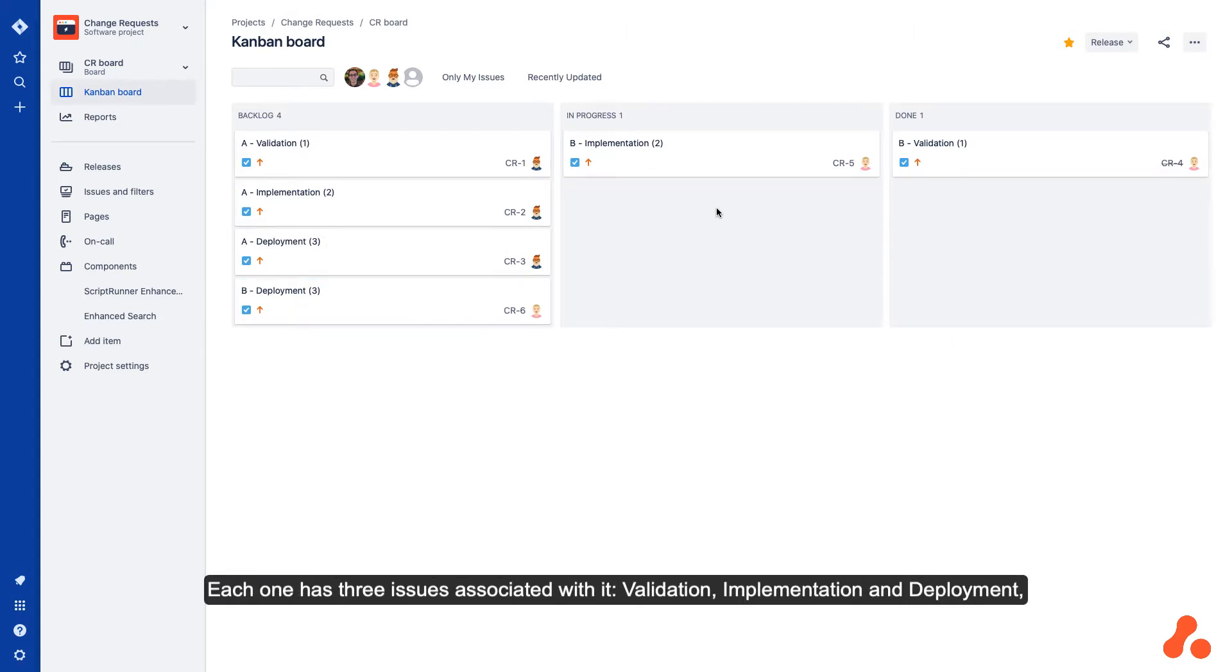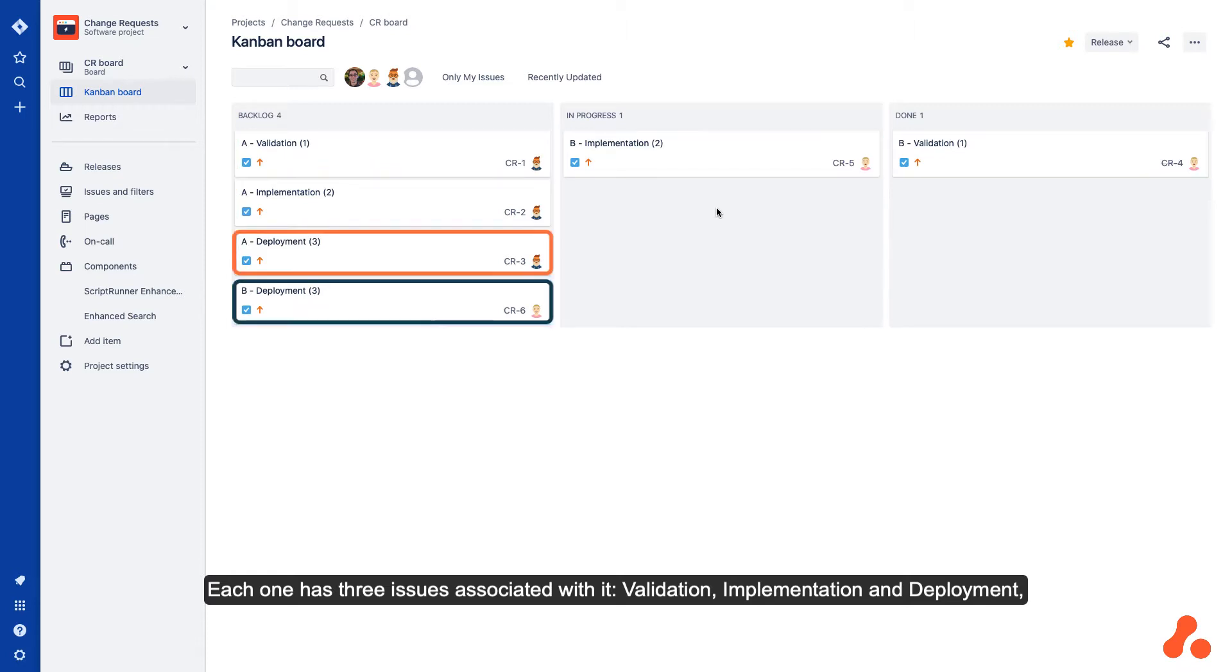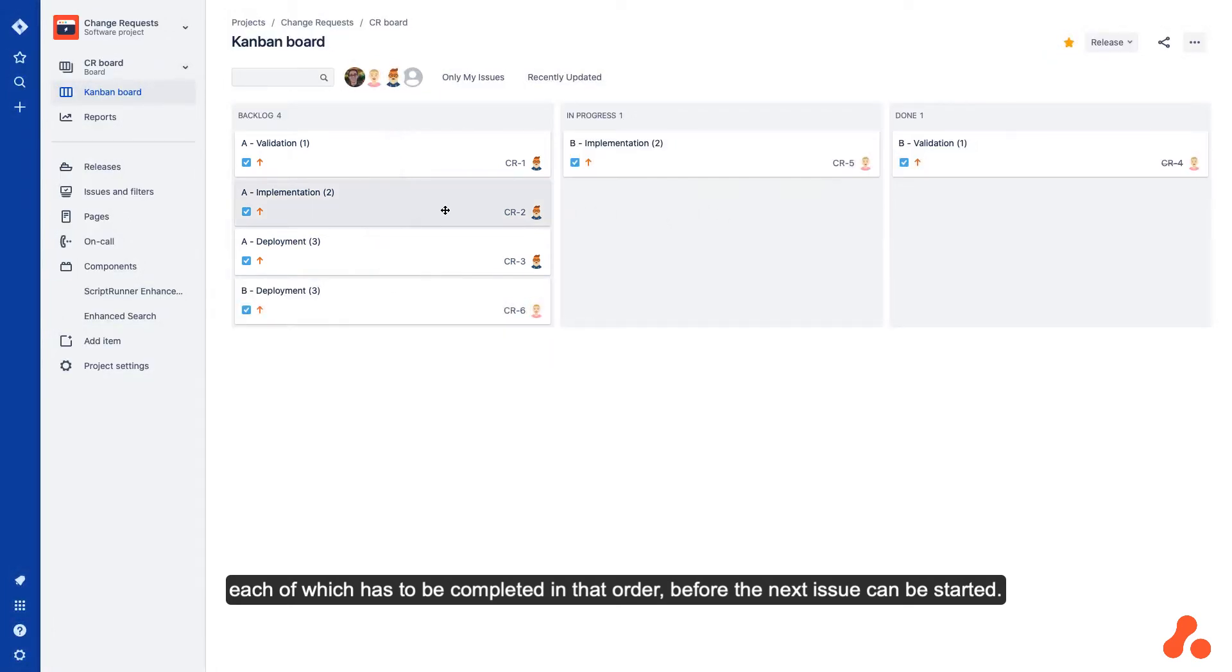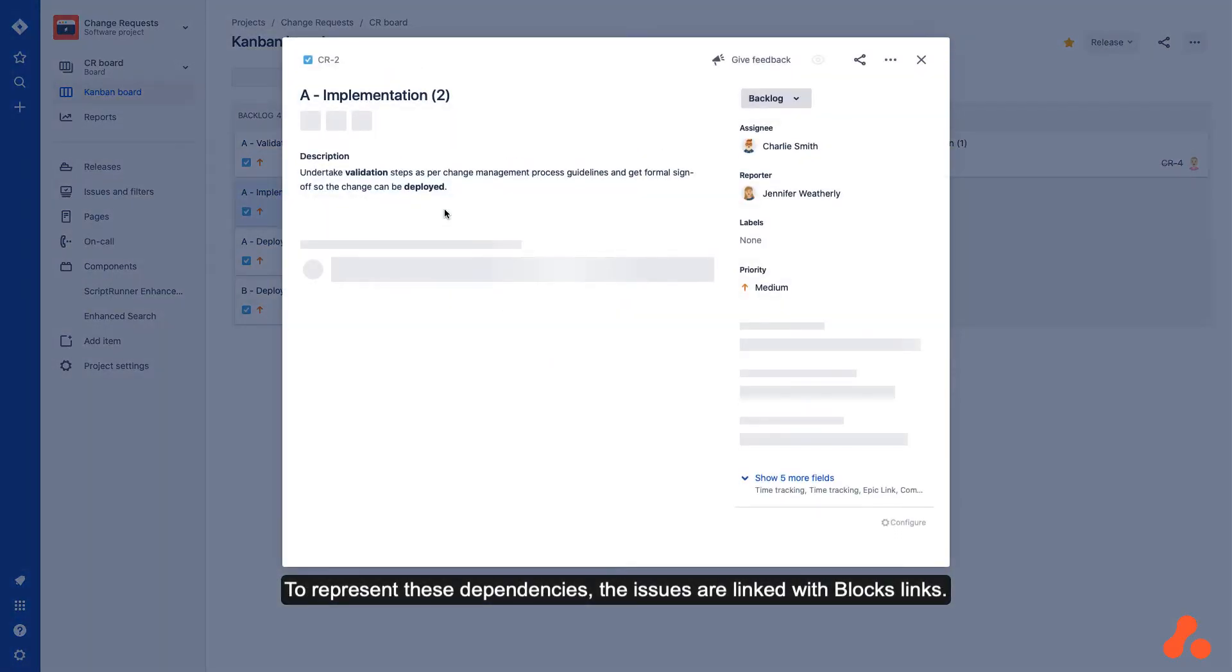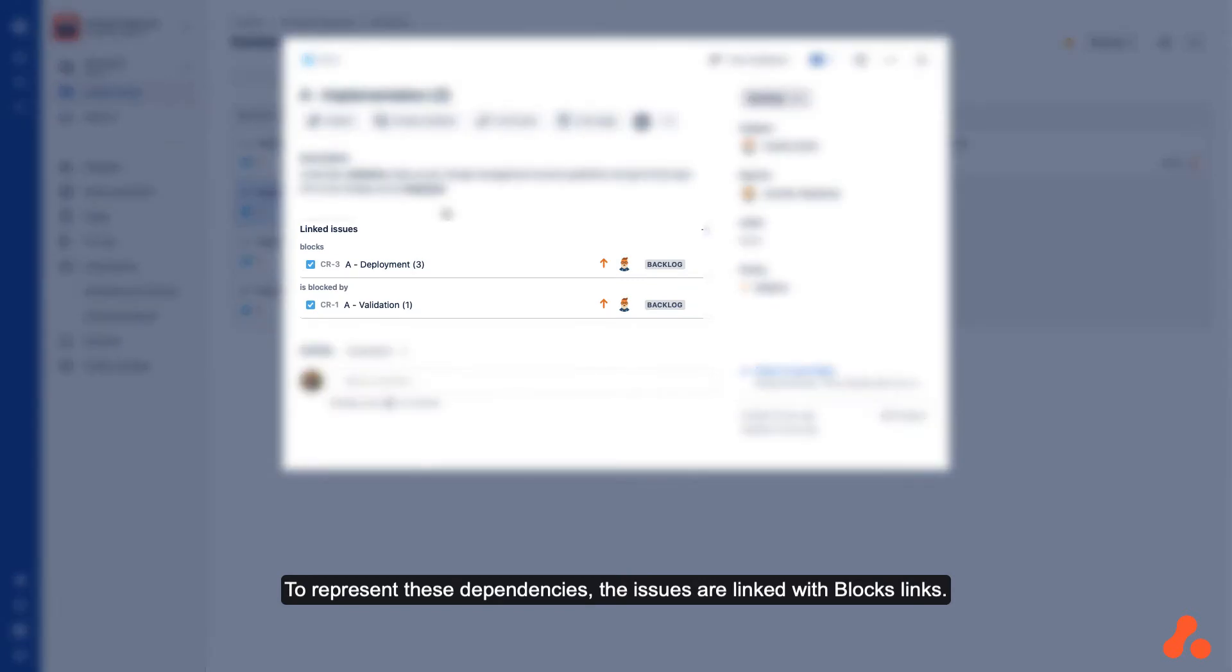Each one has three issues associated with it: validation, implementation, and deployment. Each of which has to be completed in that order before the next issue can be started. To represent these dependencies, the issues are linked with block links.